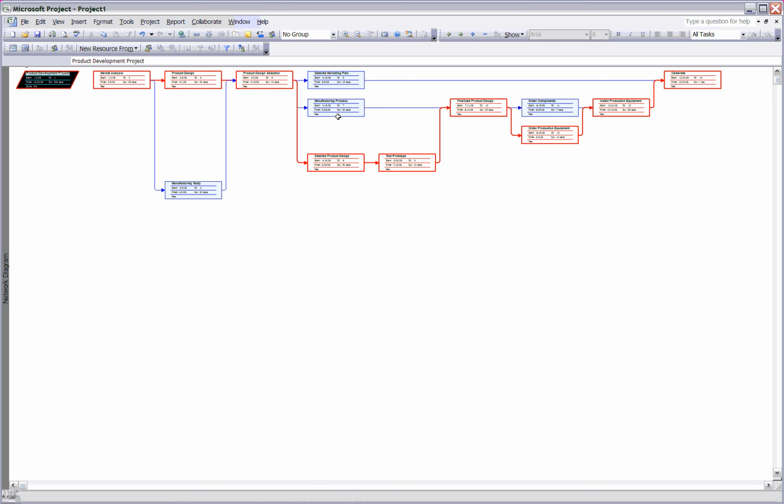And also finalizing the product design is a critical merge activity within this network. So the beginning of this activity, or July 11th, would be another milestone. And like in this case, sometimes, most of the time, the names of the activities themselves can give you a good indication of how important they are.